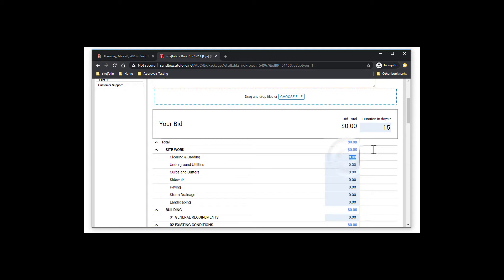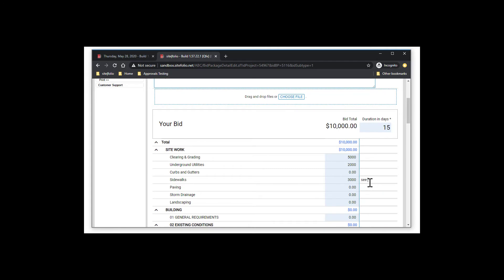As you scroll down the page, for each line item that is relevant to the scope of work, provide the total estimated cost. Any breakdown of numbers or further details can be called out in the bid documents that you attach to this bid. You may also call attention to these details by keying in a note for each line item as needed.